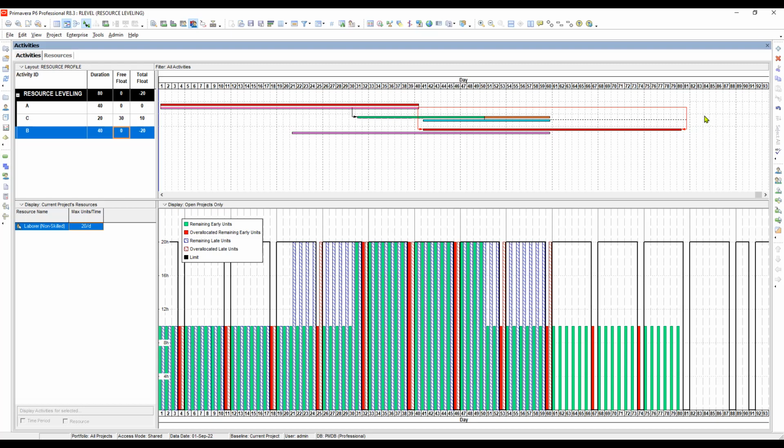But in reality, you are not allowed. Once you establish a project schedule, you are given the time frame when you want to finish, and the completion of the project is an ultimate requirement. So this one is only to show you how the leveling really behaves in projects for the over allocation of the resources.